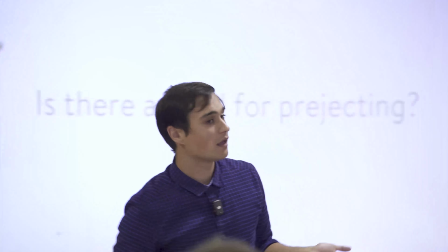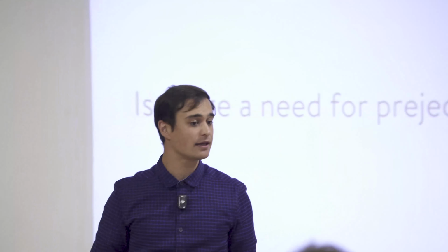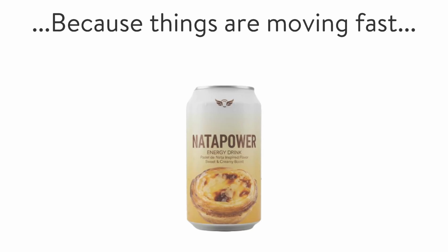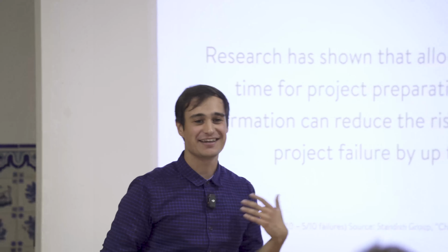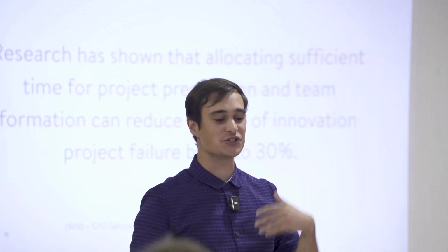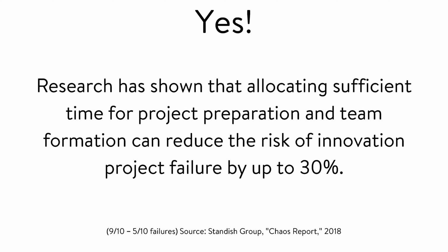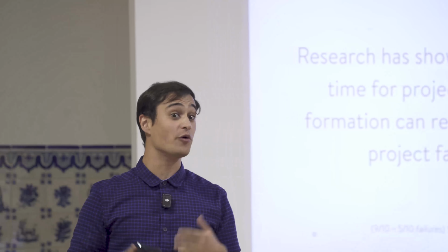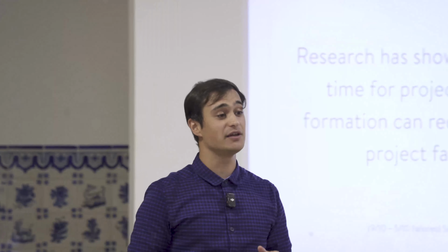But the million-dollar question is, is there a need for projecting? Because things are moving fast and weird products are being made. And the answer is yes, because research has shown that allocating sufficient time for project preparation and team formation can reduce the risk of innovation project failure by up to 30%. So, in other words, it's also a risk mitigation tool if you want to sell it to the corporate world and the VCs.